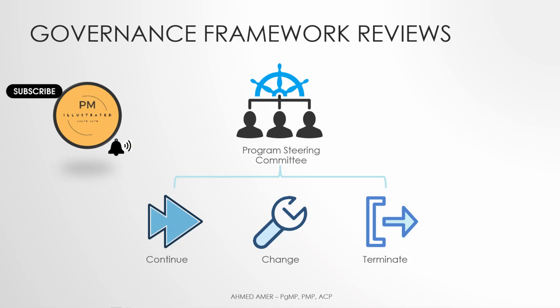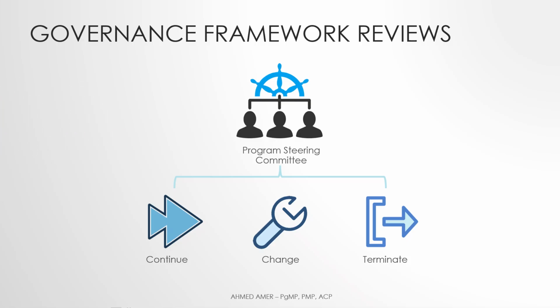Please also note that sometimes a decision point review may lead to terminating the program. For example, if it's unlikely for a program to deliver its intended benefits, or if the required investment can't be supported, or if a portfolio review decides the program should no longer continue.